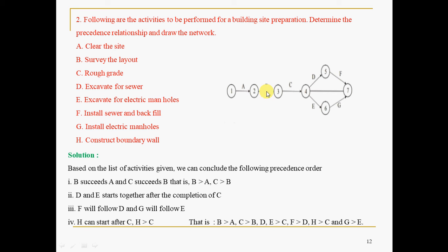Whereas if you take A, B, C, you may think I'll take A and B also simultaneously. No, sometimes it is not possible. Unless you complete a particular task, you cannot take some other task. In such cases, you have to go in series only. But wherever there is viability or feasibility, you can take them parallelly. You can build the network like this: D comma E, F comma G. So it will save time. For example, this takes 10 days, this takes 10 days. As you are taking them simultaneously by two different teams, the optimization is done here. Within 10 days, you can complete D and E.